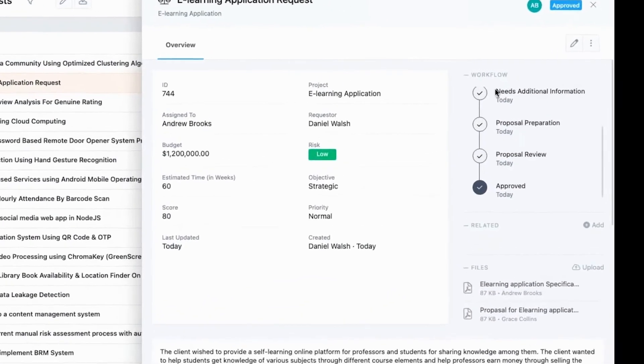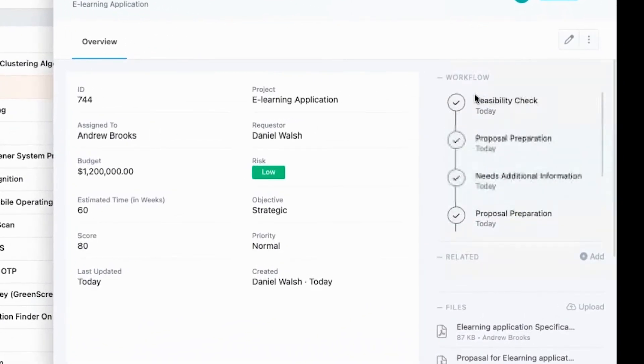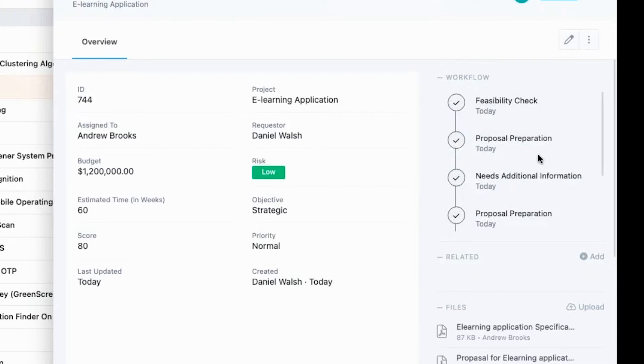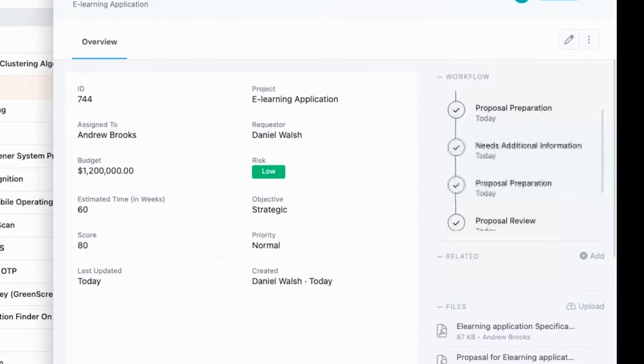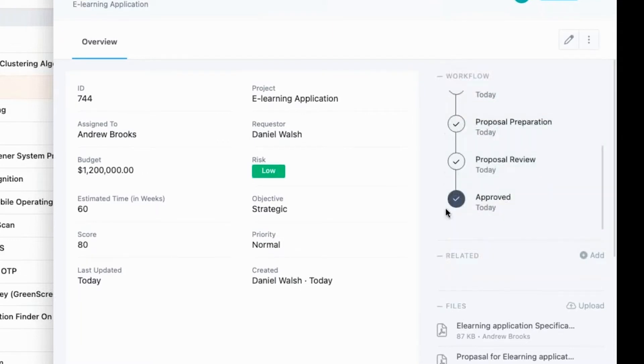Here, you can see the workflow for the project request. The request moves from feasibility check to proposal preparation and so on before being finally approved. This workflow is fully customizable.